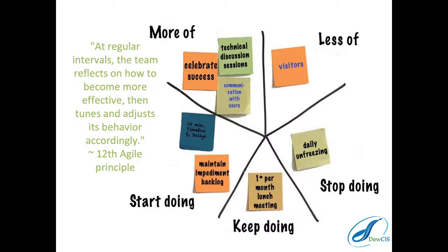And to me, a task is something you can do in a day. So you need to break down the user stories into small tasks that everybody can pick and complete, and start to see the movement of tasks from tasks to review to done, so that as the sprint goes, that is very clear.